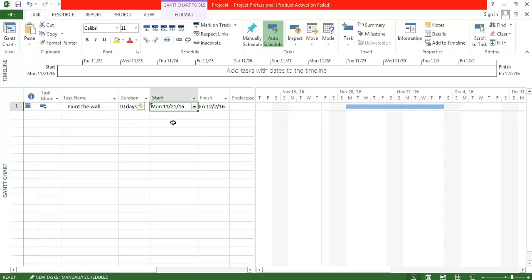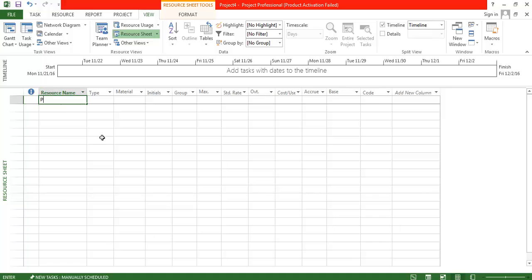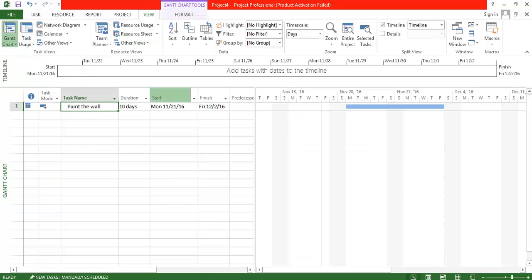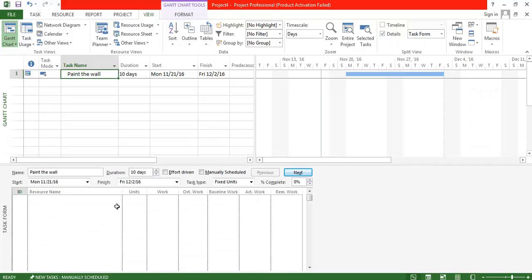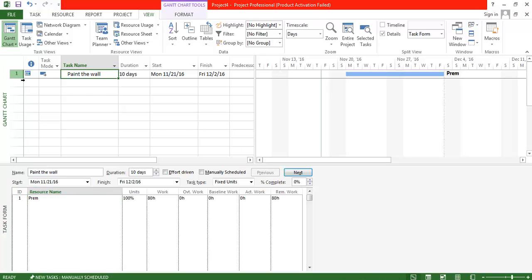Now I'm going to assign a resource. Let's create a candidate who is available at 100% and works eight hours per day. I'm going to assign this candidate to this task. For that, go to the task form view. Note that by default the task is a fixed unit type and the resource name is assigned there.